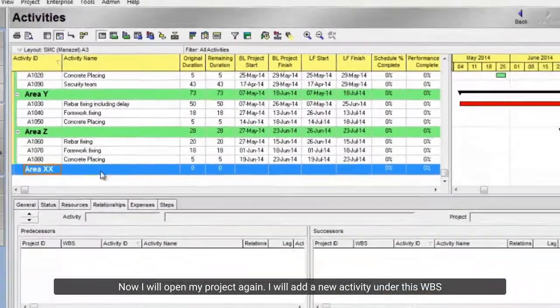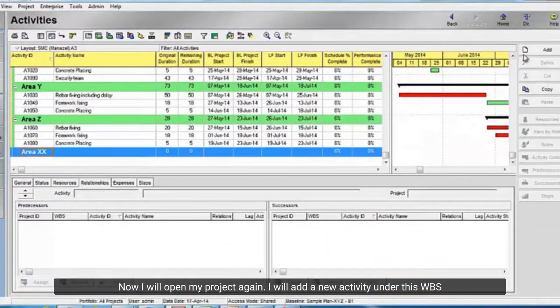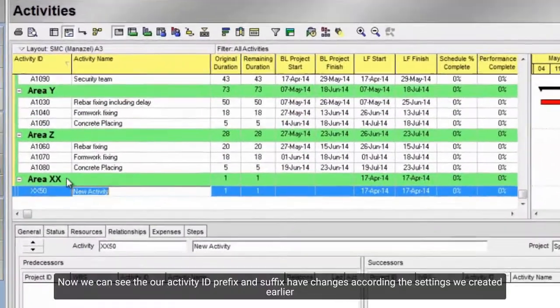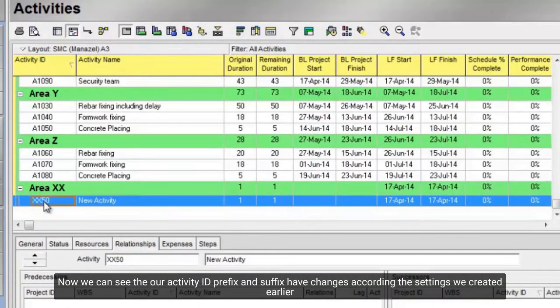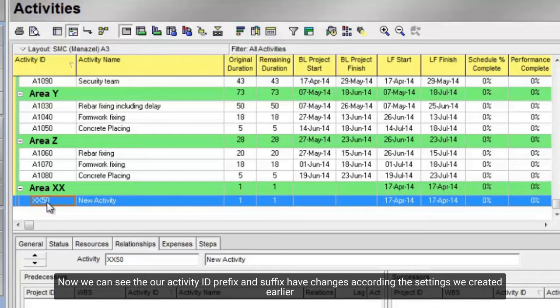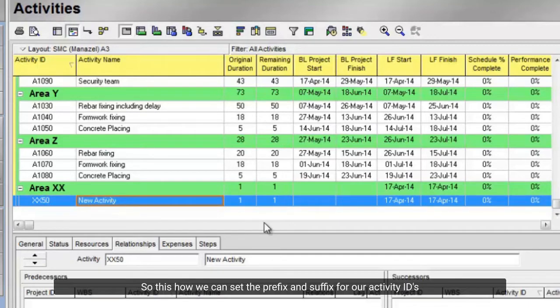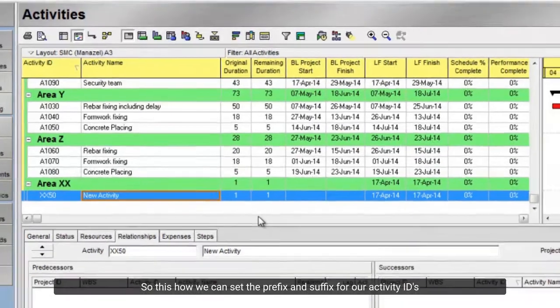I will add a new activity under this WBS. Now we can see our activity ID prefix and suffix have changed according to the settings we created earlier. So, this is how we can set the prefix and suffix for our activity IDs.